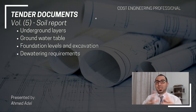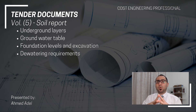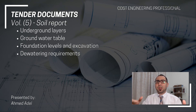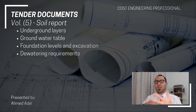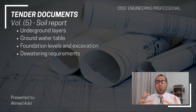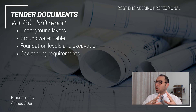Volume five is the soil report. From the soil report you can learn about the underground layers, groundwater table, foundation levels, excavation requirements, dewatering requirements, and piling requirements. The soil report is a very important piece of information that you need as part of the tender documents.